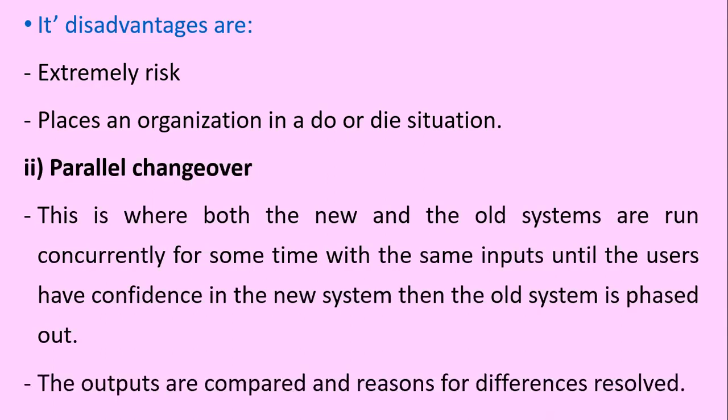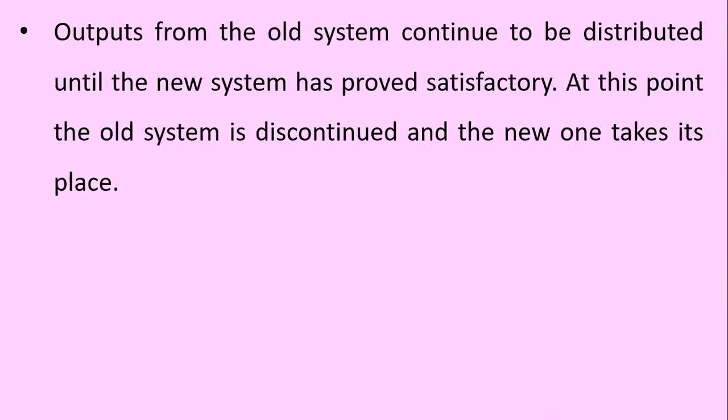The outputs are compared and the reasons for differences are resolved. The outputs from the old system continue to be distributed until the new system has proved satisfactory. At this point, the old system is discontinued and the new one takes its place.